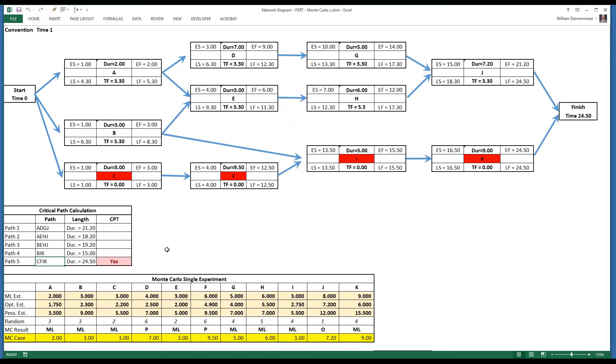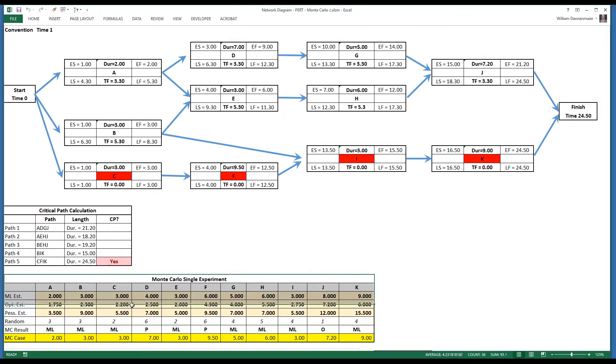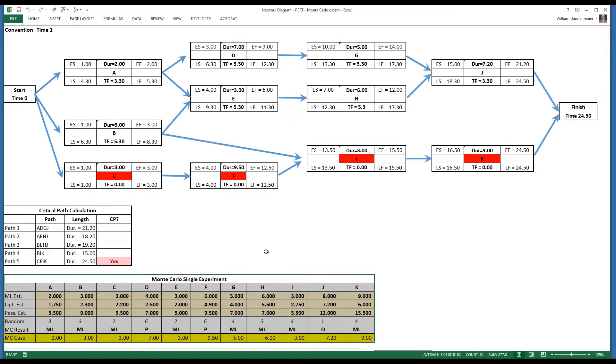If the path is on the critical path, it's noted in this diagram. As we said, CFIK is the critical path in this network diagram at the moment, and it says yes on the column that says CP question mark for critical path. Below the critical path area is the Monte Carlo single experiment or iteration area.